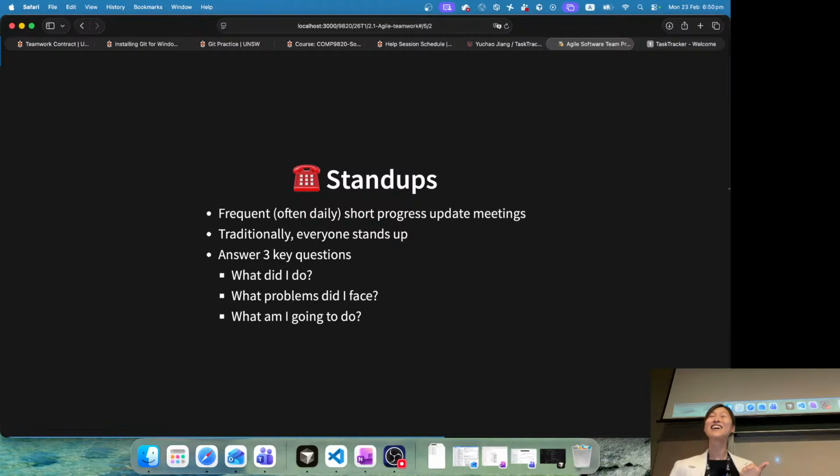So in case everyone's facing any problems, challenges, obstacles, make sure that people are aware of it and can help solve the problem as soon as possible. Because in industry or in software groups, a lot of the time people are working on features that are dependent on each other. So this is very often. If I got stuck, someone who is waiting for my deliverable may also get stuck, and people working on this one may also get stuck. So any obstacles need to be solved as soon as possible. So this is why it is important.